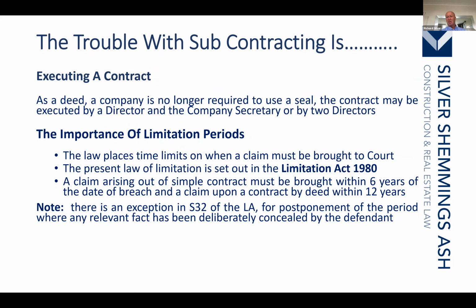And where the limitation period is becoming close to coming to an end, they're suing everybody. And what they've got to determine is, have they taken the necessary action within 6 years or 12 years as applicable from the date of PC? So that's the limitation period.